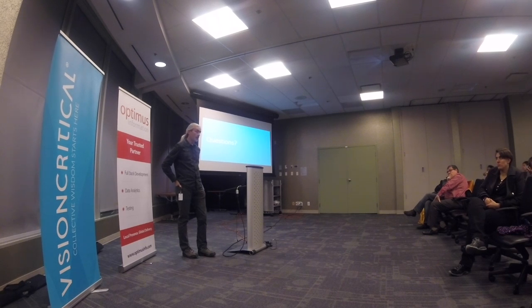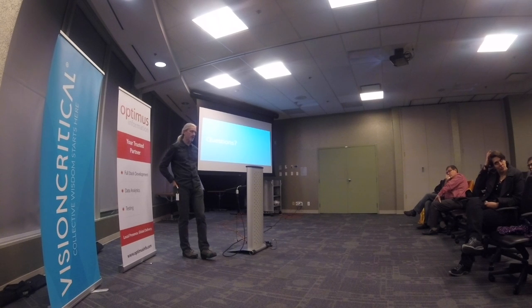We're going to write some tests that we're all going to agree on to say, these are the crucial, critical, top-level tests that are probably system or end-to-end or UI-focused tests that prove that when we've delivered this thing, it does what you wanted it to do. So ultimately, the PM signing off. And that removes the vast majority of those requirements-based issues because you've now made sure that everyone's on the same page. They all have the shared understanding and they have a test first before they do it.